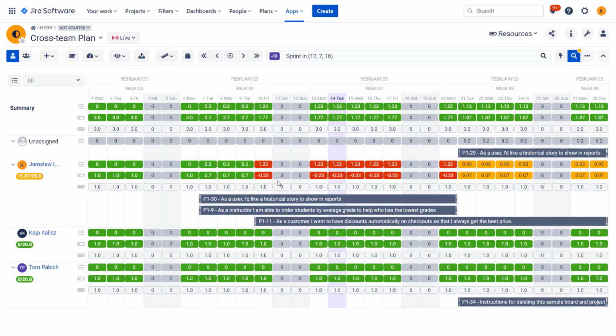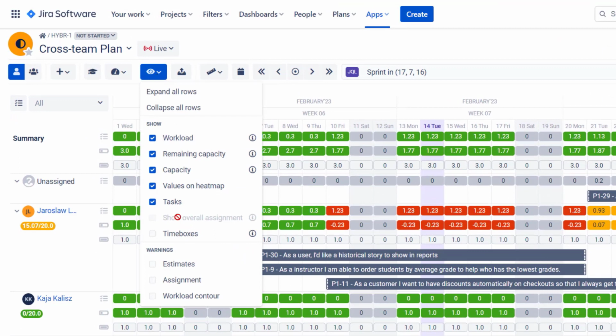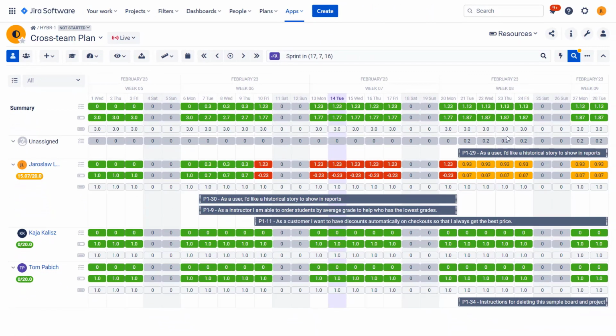So you will see the overall allocation of this resource, because at the moment I see only tasks allocated in this box or in this plan, right? So if the same resource would be used in multiple places, there would be a risk that I would over allocate the resource without knowing that. BigPicture Enterprise solves it really neatly with this one. If you do not have BigPicture Enterprise, there are several ways to work around that, but to choose the best one, it's rather hard without knowing context. So if this is your case, let us know. We'll help you figure out what to do next.